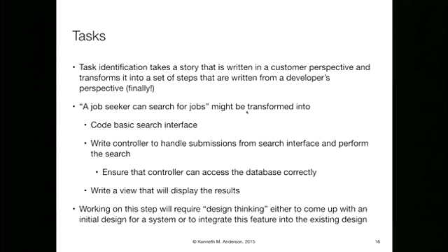Someone else will say, okay, I'll make sure that the database is set up to take the old information and put it in an archive database, or at least create a log of what it used to be, so if we need to recover it, we can. And then I'll write the code that updates the database, and I'll put that API routine here. That's probably a day's worth of work, so it takes me 8 hours. Okay, and then I'll write the little Google-style search interface. I can just copy most of the things that are on the web. For that, that'll take me a couple of hours.